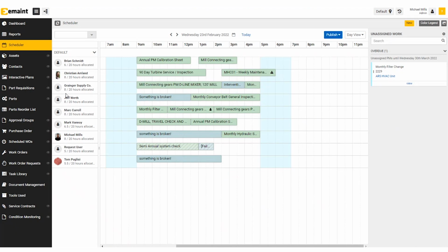And the reason for that is when you look at this, they have a calendar assigned to them. If I work from 9 to 5, Monday through Friday, great, it will show that as my work week. If I work different shifts, like if I work from 5 until 2 a.m., it'll take that information and allow me to schedule only during certain hours.